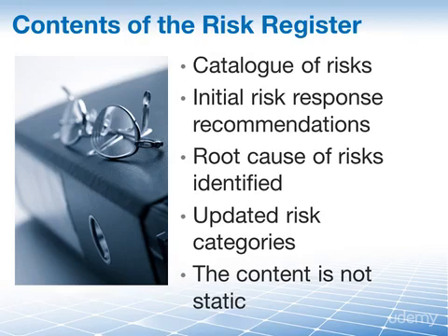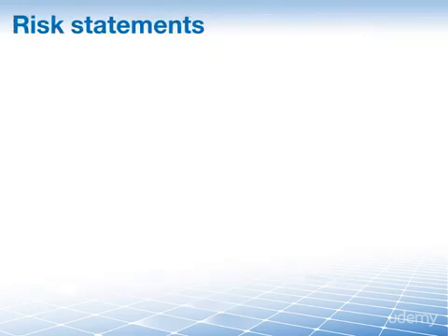In order to do a proper job of analyzing our risks, a standard structure or format should be imposed for recording our risks. And here we're talking about risk statements. A risk statement is a way of documenting your risk that provides enough information to determine the probability of the risk occurring and areas and degree of impact the risk poses if it is realized.